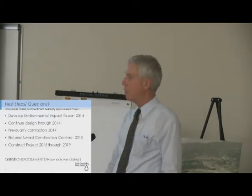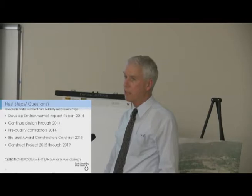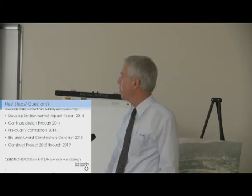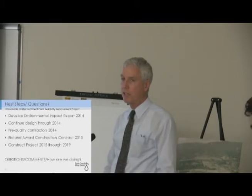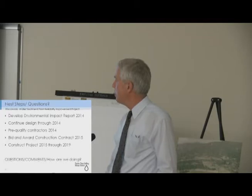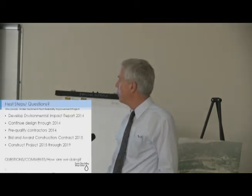pre-qualifying contractors. A really big step for us. We don't want problem contractors on the project. That can be a real nuisance and really delay the completion of a project, and it just creates lots of headaches and additional costs. So we're trying to screen the possible bidders on our project down to a select few quality contractors. We expect to bid and award the construction contract in 2015 and start work as soon as we get a contractor on board. We're doing a lot of work right now to get ready for that.